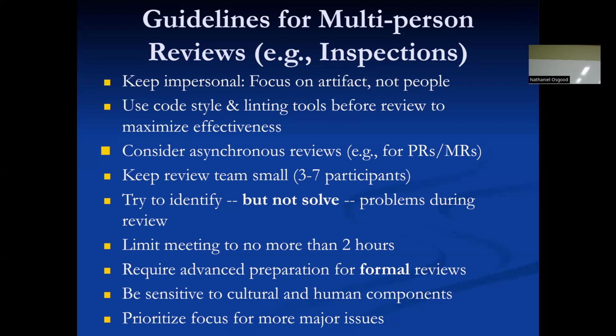And so you want to be attentive and ask again, how can we improve our game? Same thing with retrospectives following deliverables. The question is not to conduct a witch hunt: why didn't that get checked in on time? It's how can we do better as a team? What can we do that will help us do better at the next delivery? If you approach it in that way, not pointing fingers but finding ways we can improve our process, you can often use the time much better.